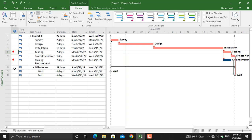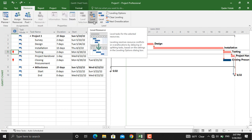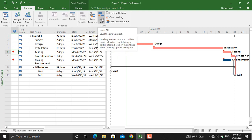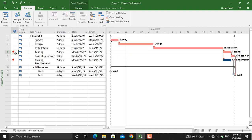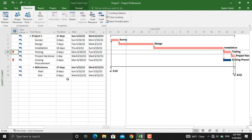We will go to resource and we can use the level resource option, level all, and by right-clicking here, reschedule to available date. All three of these buttons perform different types of tasks.